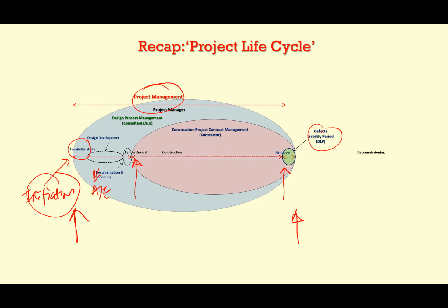After the contractor is awarded a contract, the contract is already formed between two parties, the client and the contractor. The signing might be later, but once you are identified as the winner, the contract is already formed.